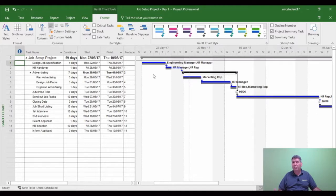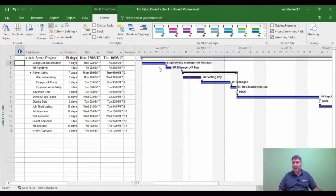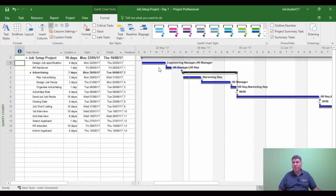Now the grey bar displays the baseline. So if anything were to change, the blue bar would either move forward or backwards, but the grey bar will always show you where you should have been. So that's the beauty of setting a baseline. It really does give you a picture of your project at the start before any changes were made.